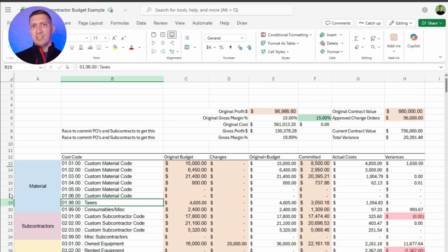If you look at a civil set of drawings and you're supposed to cut 10 foot across this giant span, that could be 10 foot or that could be 8 foot or that could be 12 foot in some of the same spots. But the land survey doesn't tell you that. So there's a lot of areas when you're doing that. Now we have to figure out how much we're going to fill. That's a little easier, but it depends on what size of bucket they use to dig it out. We have to think about how much are we going to cut and haul off. What if that's more than what we assumed? And what if it's less?